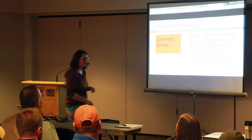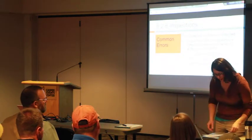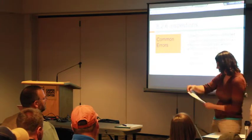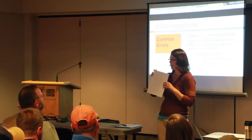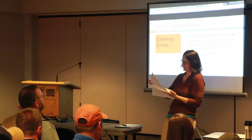One of the things we notice is a lack of compliance statement. If you look at that template, it's double-sided, page 4 of 5 of that template. As you're reading down here, you'll see, was the site found to be in compliance with the SWIP and the permit? If you don't have something like that on your inspection document, it's not a compliant document. This one, I would say like 99% of permittees miss. Now you guys don't have to be that one. But Jessica has to write a violation report because you have that missing. So make sure you have that on your document.